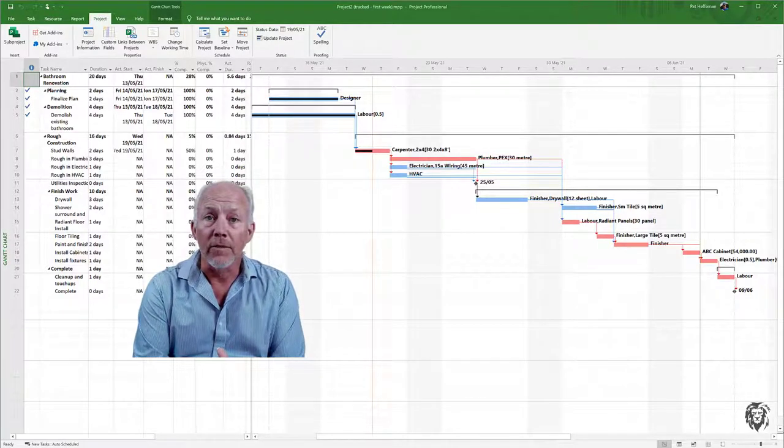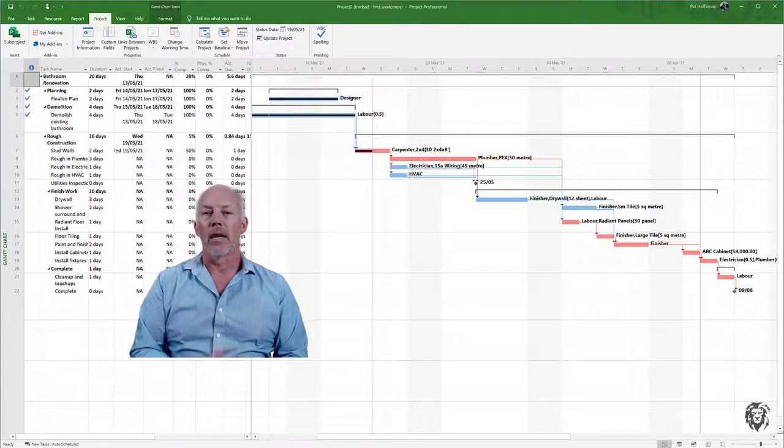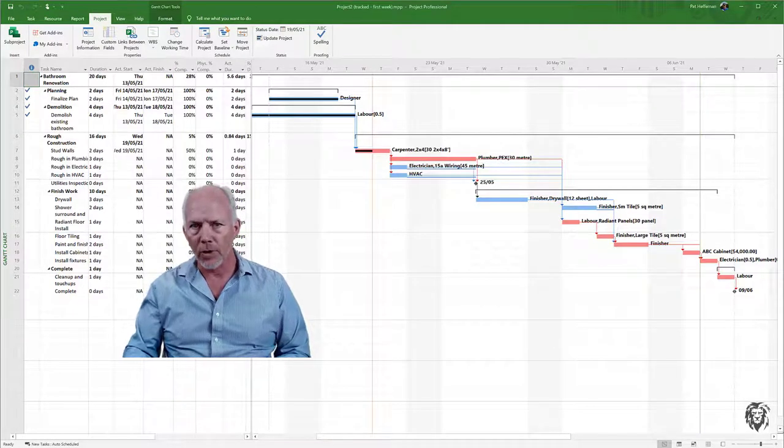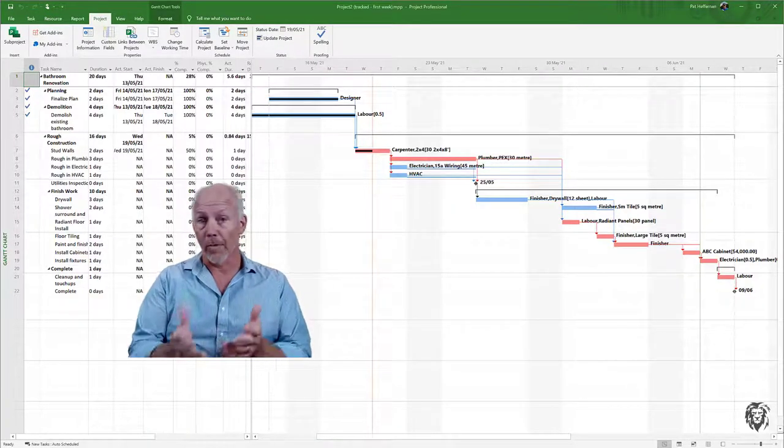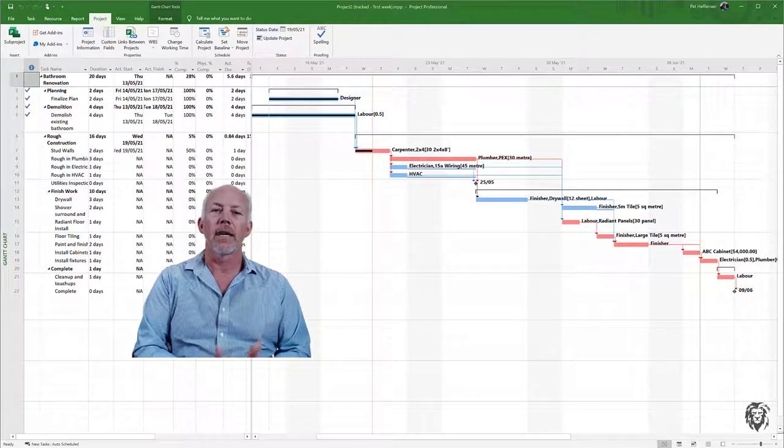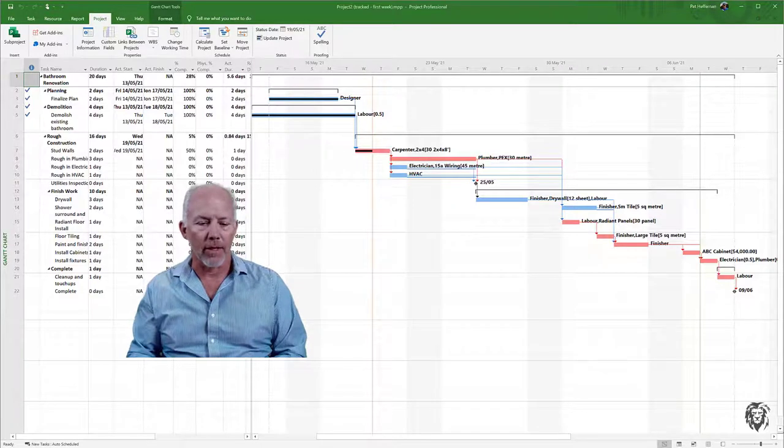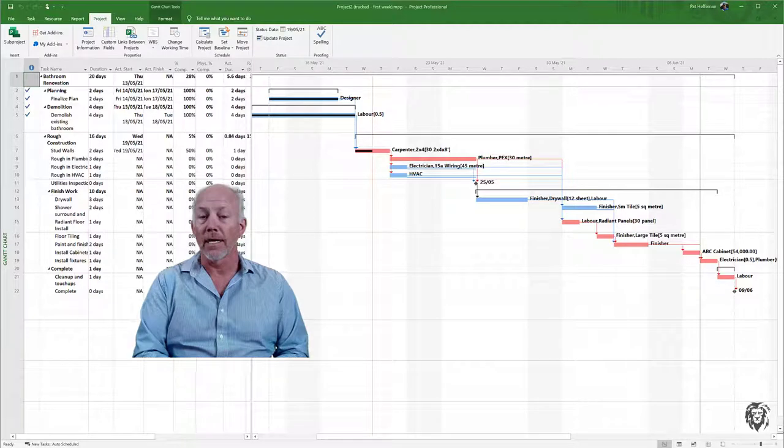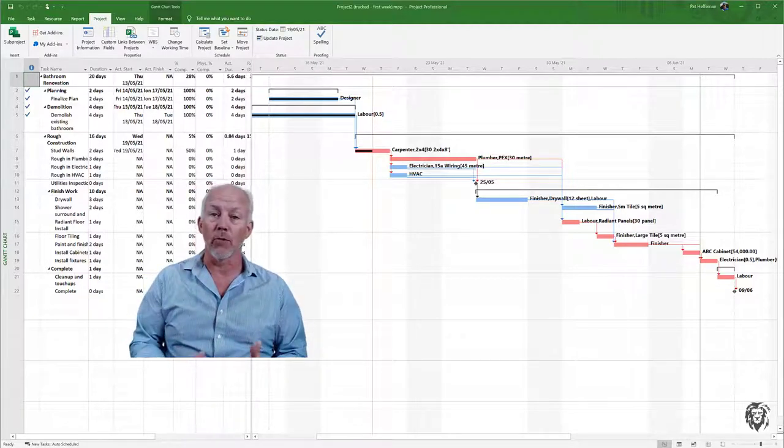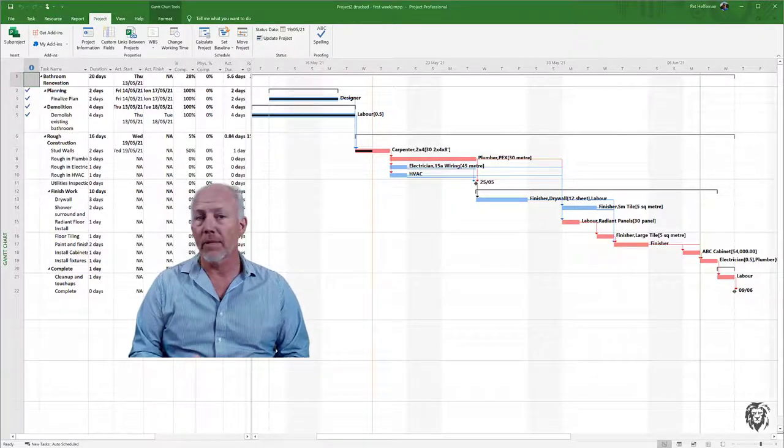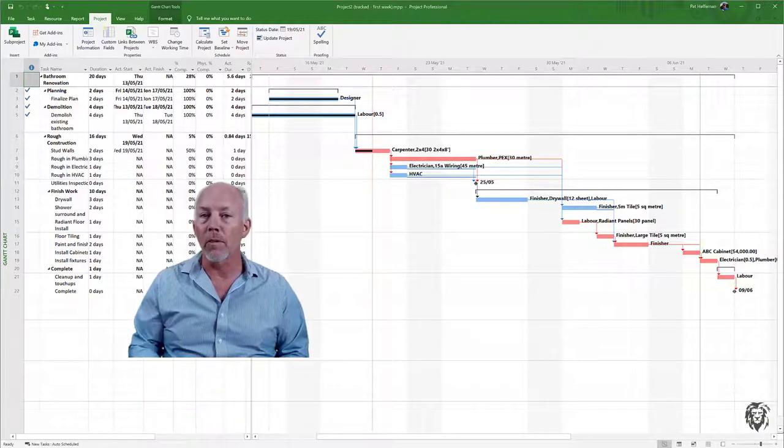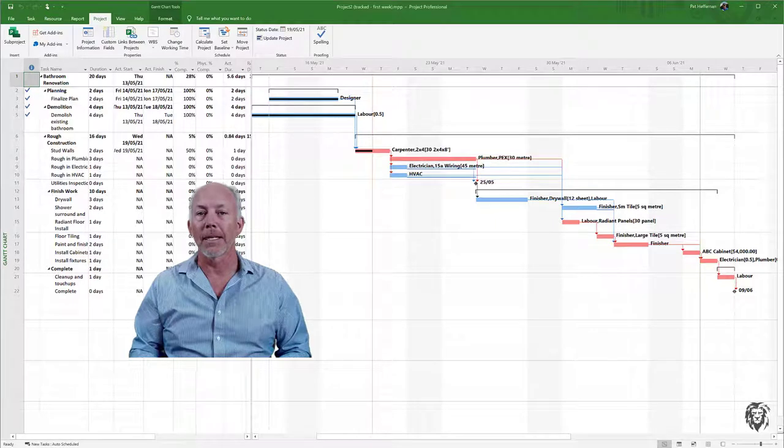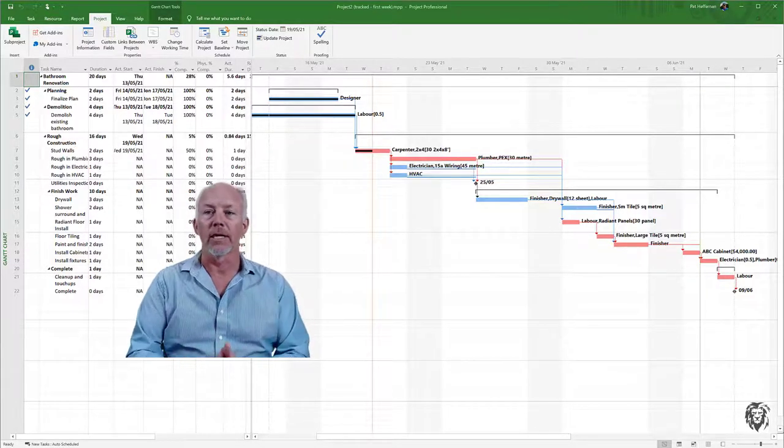In the meantime, we need to consider crashing our project. Crashing means we're going to buy time by spending money to shorten our project. Now, if we're not spending money to buy the time, you have to wonder why we weren't doing it faster in the first place. It's possible we have inefficiencies we can address at no cost. But let's assume for this exercise that we're working at maximum efficiency and can't achieve a shorter project without spending money.